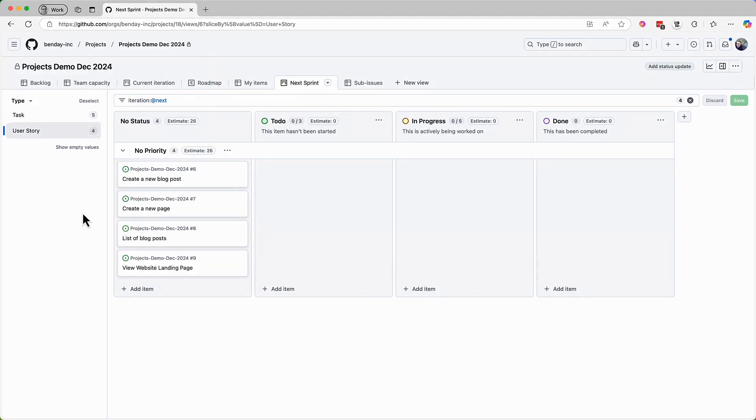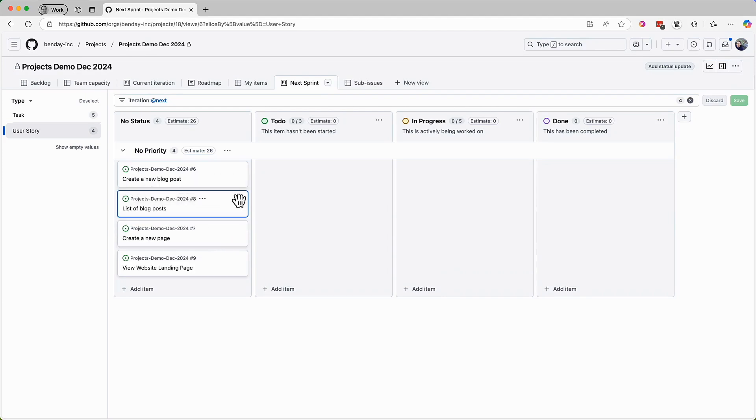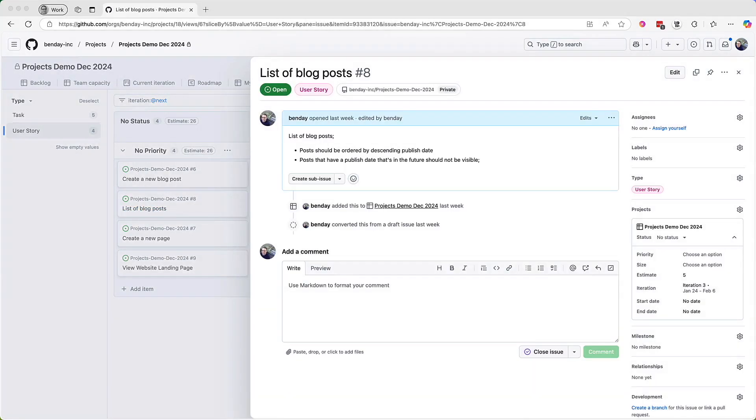One of the things that commonly happens in sprint planning is changing the relative priority of the requirements in the sprint. If you need to make those changes, all you need to do is just drag the cards into the order that you want. Continuing with sprint planning, let's add some sub-issues, some tasks for the next PBI. Here are the details for this next requirement. And let's say that the team, once again, has already thought up their list of tasks.